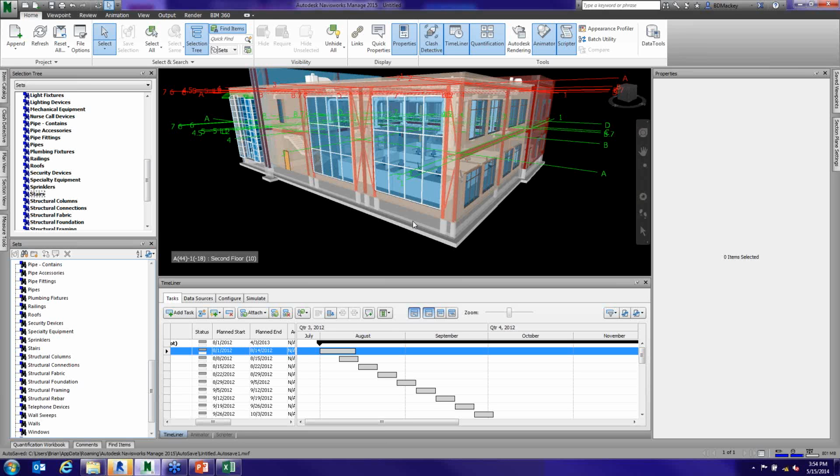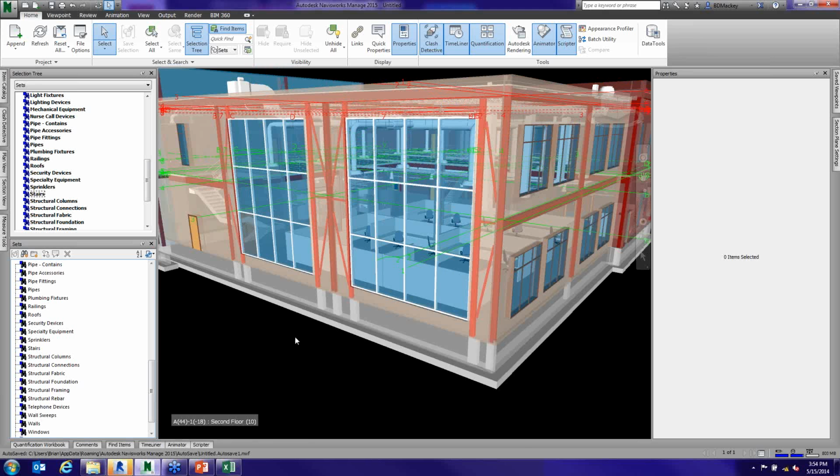So yes, it has to come from the authoring software for the most part, and it's garbage in, garbage out type scenario. If you want that wall to show phases of the wall, then you're going to have to model it 6 separate walls. So yes, that definitely starts to happen in there. No way to divide it up, etc. It's all just coming from the authoring software.